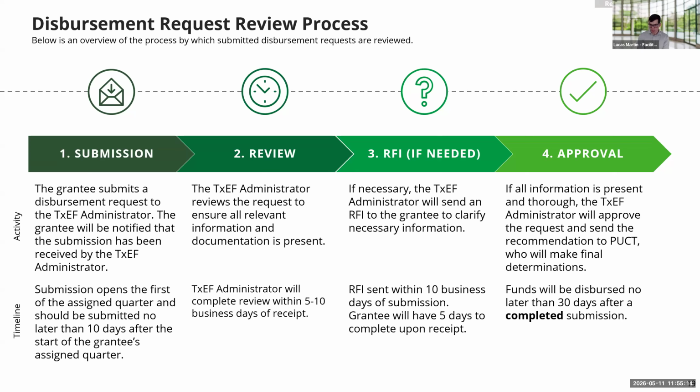As mentioned earlier, the intention is to get funds out the door to you all 30 days after a completed submission. Again, completed meaning the last submission, meaning if you had to respond to an RFI, that would be when the 30 days starts. With that, we come to the end of the disbursement requirements section of the webinar.